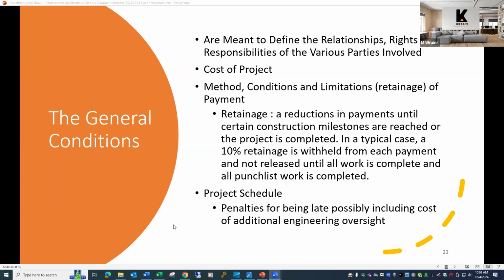It'll be reviewed and released for each of the phases. Or if a pavement project is going to span several weeks, say maybe 2 months, it may be structured where there are monthly invoices submitted. So depending upon the type of project, the size of the project, and how it's phased, that payment method can be structured in several different ways.